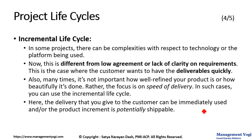Our next life cycle is the Incremental Life Cycle. In some projects, there can be complexities with respect to technology or the platform being used. Here the case is different from low agreement or lack of clarity on requirements. In Iterative Life Cycle, we went with iterations because we don't have clarity in requirements. In Incremental Life Cycle, it is not about lack of clarity or low agreement on requirements. This is the case where the customer wants to have the deliverables quickly, and the focus is on speed of delivery. In such cases, you can use Incremental Life Cycle.